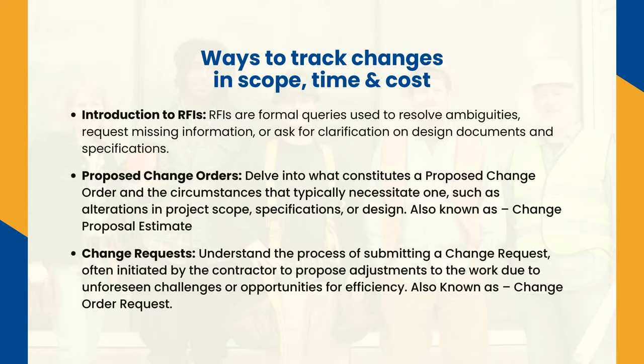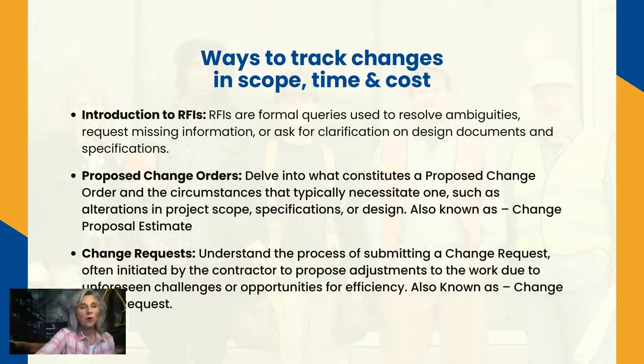A request for information is a document that is providing clarity. It's asking why this particular issue is a problem. Now, at this point in time, we don't know if it has a cost or time associated with it. And one thing that we need to make clear is that these, again, are documenting changes in our living document, our living contract. Whether it's a monetary change or a time impact change, positive or negative or neutral, it all needs to be documented.